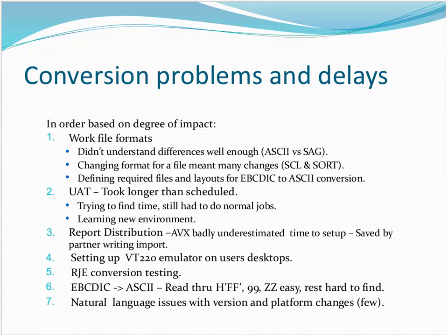The second problem, and really 1 and 2 were the big problems in the system, was the user acceptance testing. If we go back to the original schedule, it was defined for a certain number of weeks. I really just don't think that amount of time was enough. And the other trouble is we still had to do our normal jobs, so we just did not get the testing done as fast as we thought. Again, my opinion, there wasn't enough time in the schedule. And secondly, I don't know how much time you could have put in. It just takes longer than you think to do the testing.